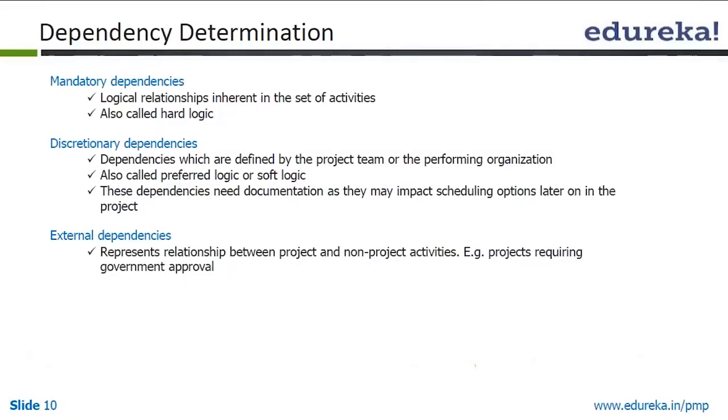Why have we put that discretionary 3 more days? Because it is monsoon time, it is raining, and the glue will not stick well unless it is given some time. So that is a discretionary dependency which you have given, of 3 days, for the glue to stick better in a monsoon environment.